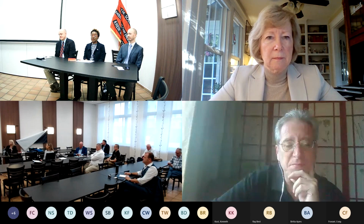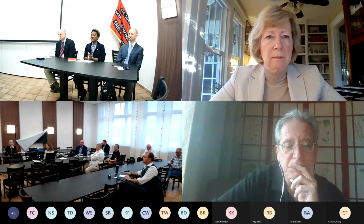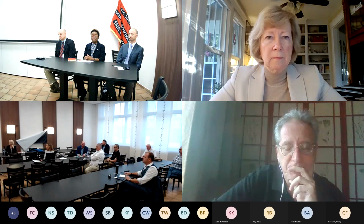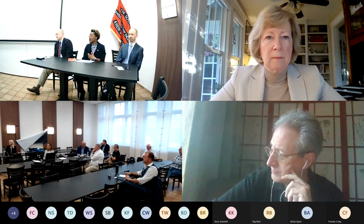So you'll see some of those changes integrated into the scopes of work that you're seeing. You'll see the new language for design basis threat analysis. You'll see requests for after action reviews. That's been integrated into the scope of work because we wanted to make sure that we have that engagement at the end of the process so that we can continue to improve. So those things have already been started and implemented, and we'll continue to do those as time allows.